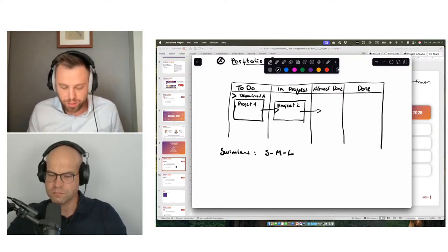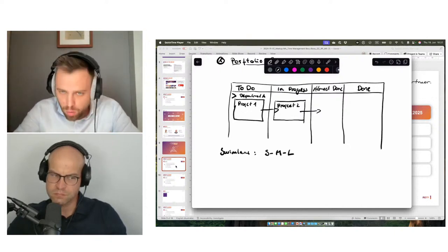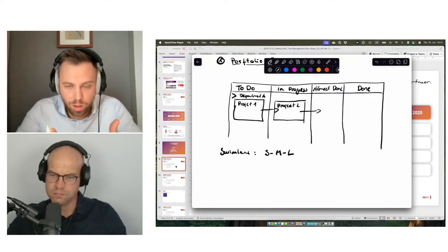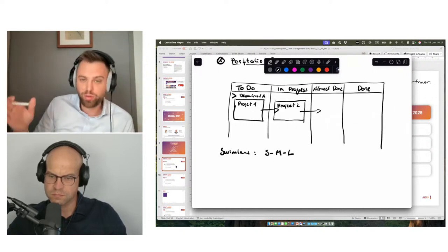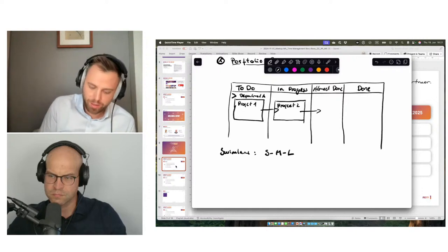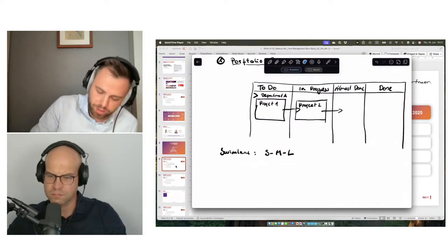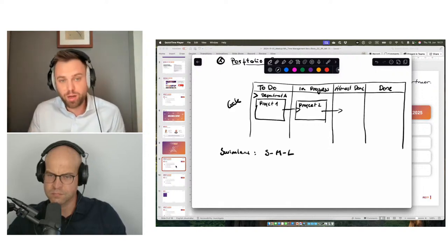And that now should be a very comprehensive overview of all your projects in the defined scope, whether it's the department or, for example, your organization. So that means all projects need to come in here, which makes it very important that before the portfolio management, there's some sort of streamlined project request and project qualification. So before stuff comes in here, there needs to be some sort of a gate. What is now a project and what is it not?